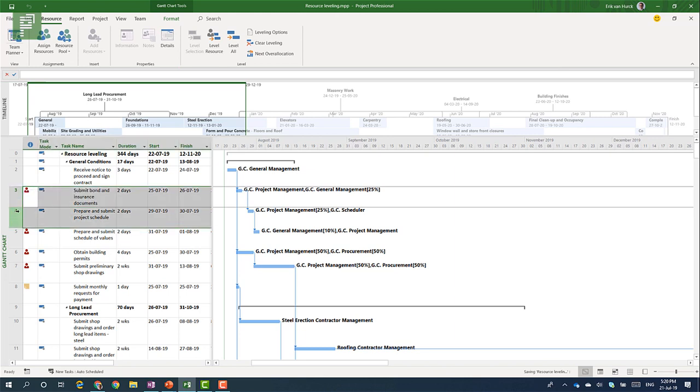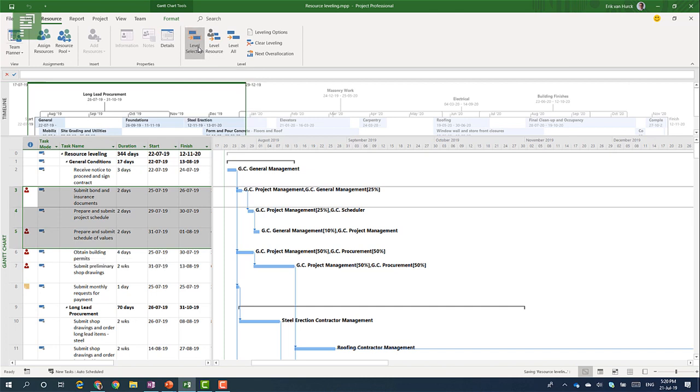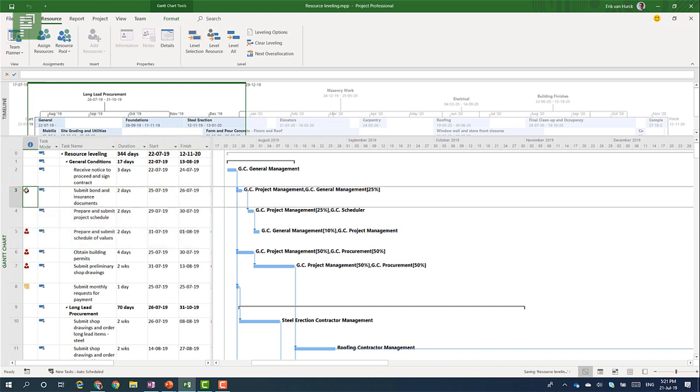But I have one selected here and it doesn't solve just one activity and leveling that. Now you will need to select multiple tasks to be able to level a selection. So let's do it right now and see what happens. Nothing happens. So that means that within this selection there are resources over allocated but they are not over allocated within that section.